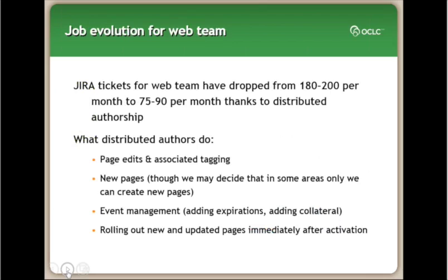One side effect of automation is that there can be some trepidation among staff about how their roles are going to change. If you have anybody at your institution, your organization, who specializes in change management, make sure you ask for their advice on this, because you won't hear about it. There's a lot of undercurrent of stress that goes on that people don't voice, and sometimes addressing that head on will keep a lot of problems from coming up.